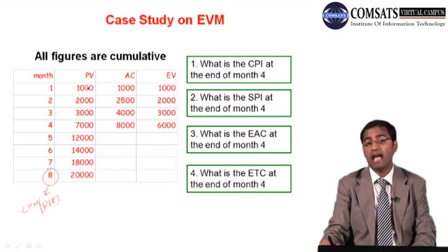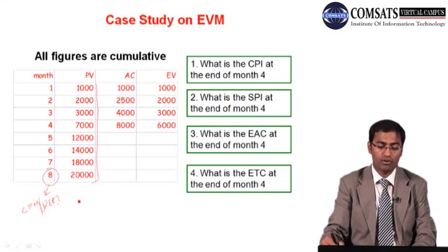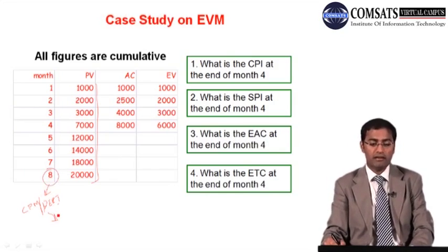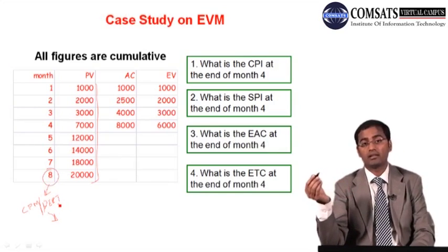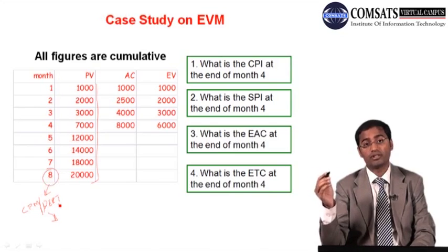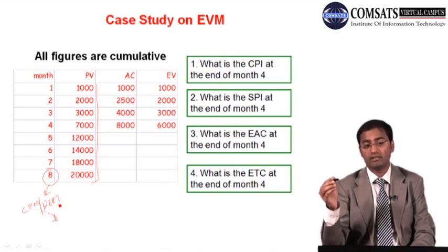And how do we have these figures with us? As we had a schedule through CPM or PERT, we had budgets through contract baselines, and those budgets were distributed among the durations, and then we had PVs, and the cumulative PVs are given over there.